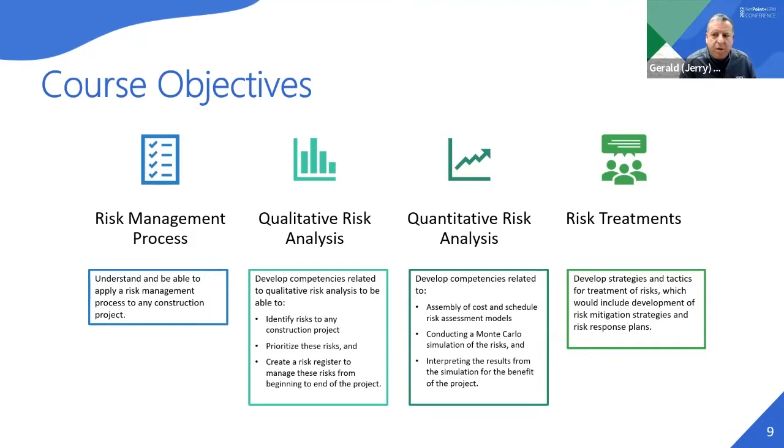You'll see in the next slide that a lot of the time in the course was spent on going through quantitative risk analysis. So we wanted to train the students on being able to assemble a cost model and a schedule model, and then being able to do a Monte Carlo simulation of these models, simulating the effect of the risks on them. One is to do all that work, and the other is to be able to interpret the results to make sense of them for whatever the end client is in terms of the analysis that you're doing.